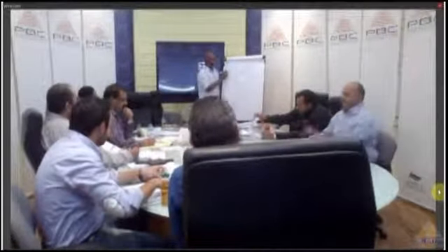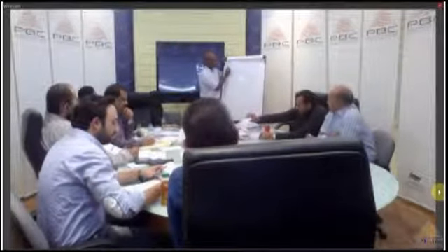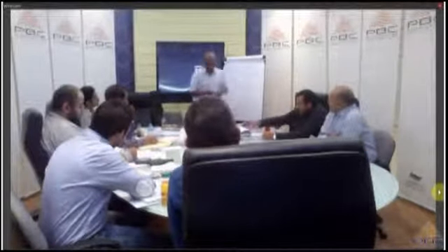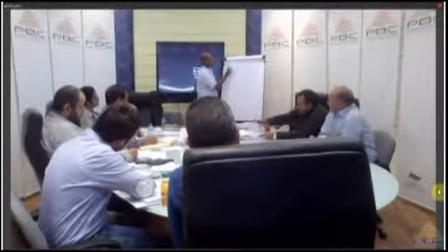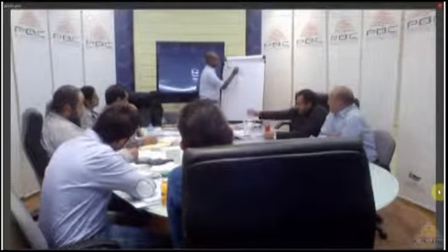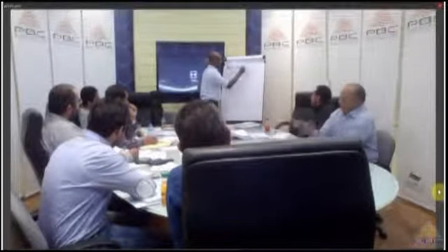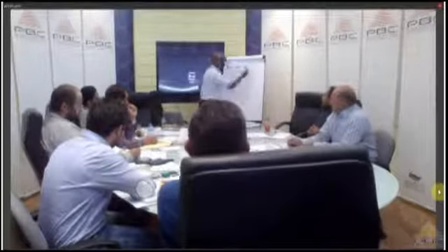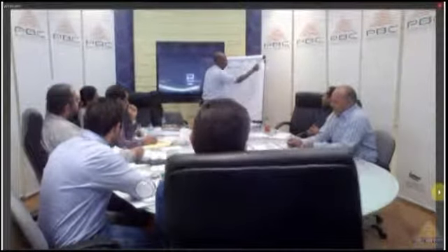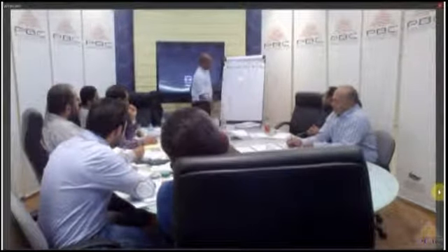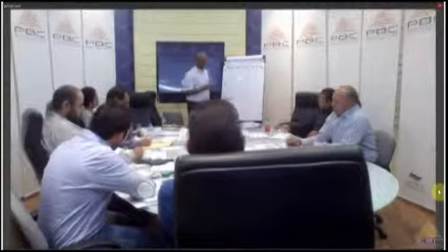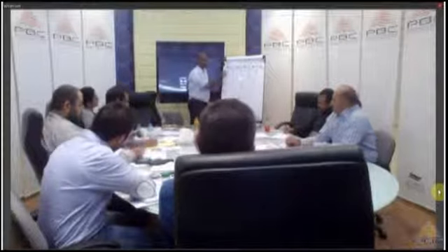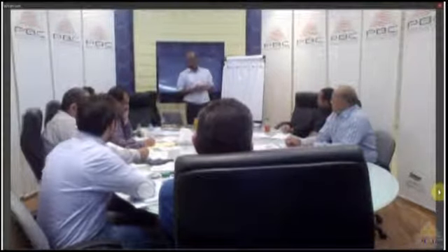The questions answered by the communication plan are as follows: Who should know what, when, how, and most importantly, why. So these are the 5 fields in any communication plan, in any project. Okay? So the who here, we list the stakeholders of the project.